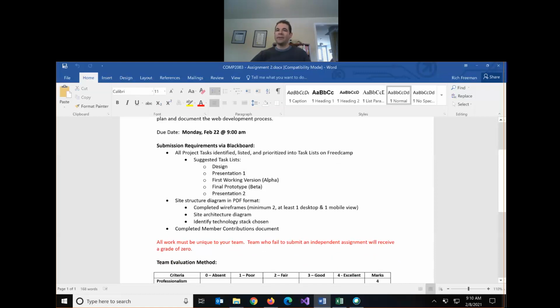Your design tasks, your tasks for your first presentation, your tasks for your first working version of the site, tasks for the final version, and then tasks for the final presentation. It's up to your team how you will organize the tasks, but those would be my suggestions. And then inside of the list, you're going to list all of the individual tasks that you need to do. They need to be identified, listed, and they should also be prioritized. You can have a lot of tasks when we break things down, and FreeCamp gives you the ability to rank them in terms of priority, so you're making sure you're taking care of the most important items first.